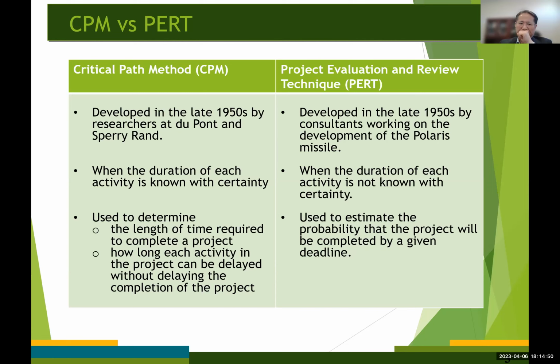So today we are going to talk about PERT just briefly. And I got to tell you that PERT is better suited when there is much uncertainty and when the time pressures are very high and the cost would be a secondary issue, right?